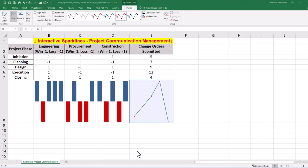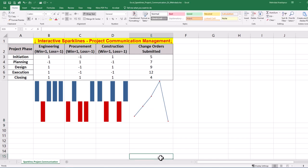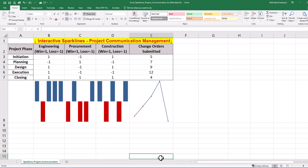Step 3 is analyzing mini charts and finding complex data trends. In the above example, inferencing can be done by correlating the communication effectiveness in win-loss sparklines with the number of change order requests in the line chart. For example, the engineering team has demonstrated overall effective communication, especially during phases with a high number of change order requests such as design and execution.